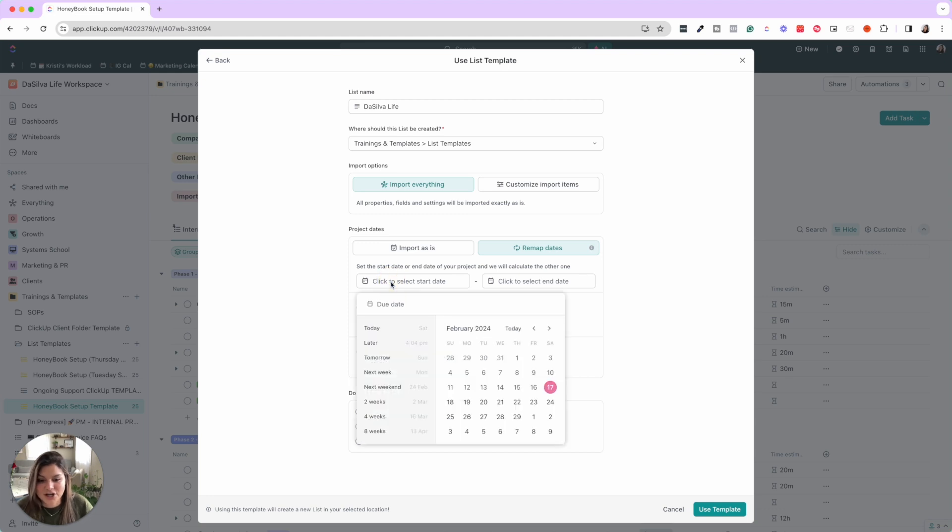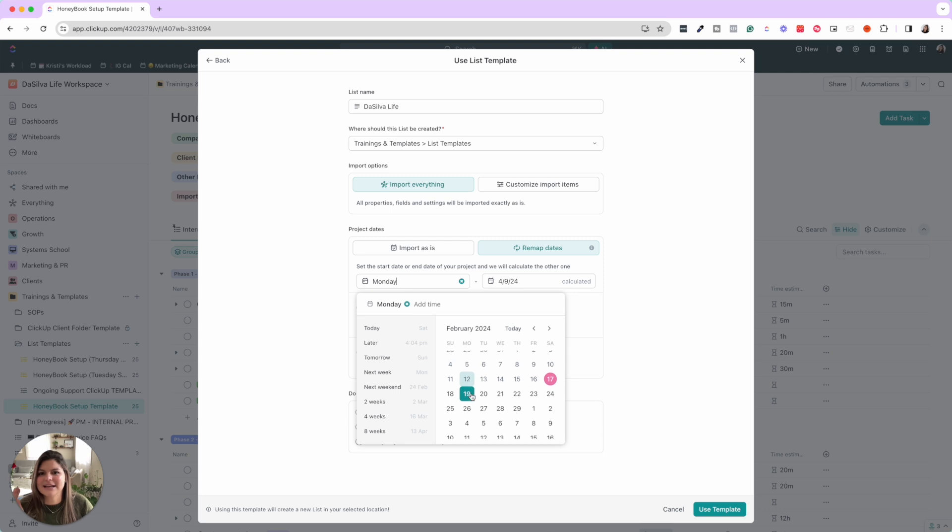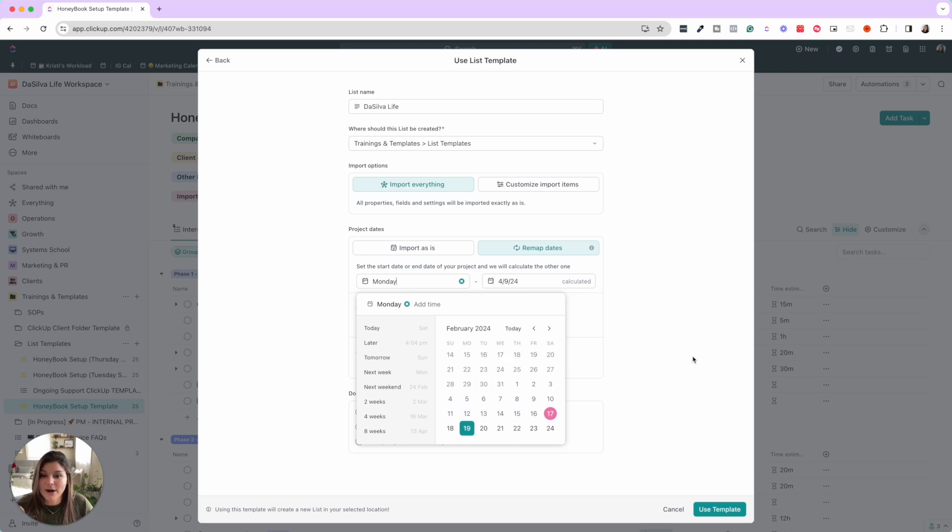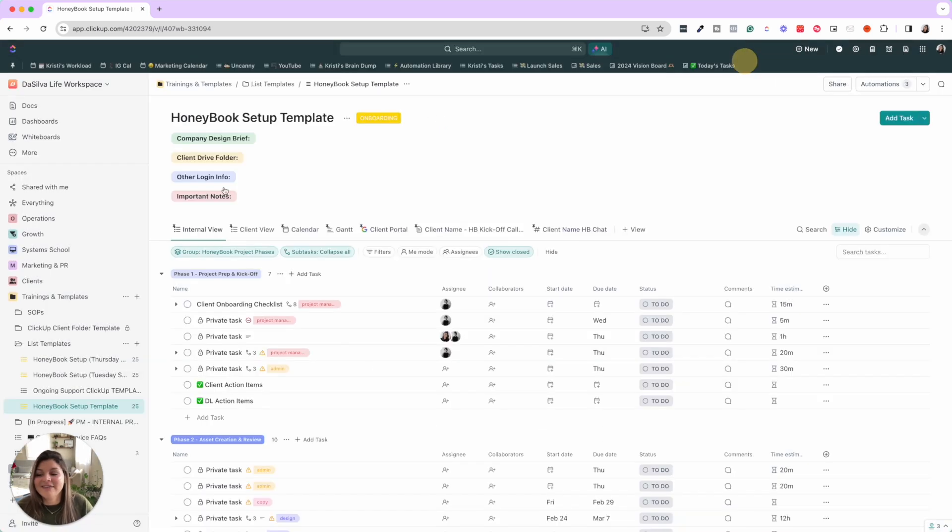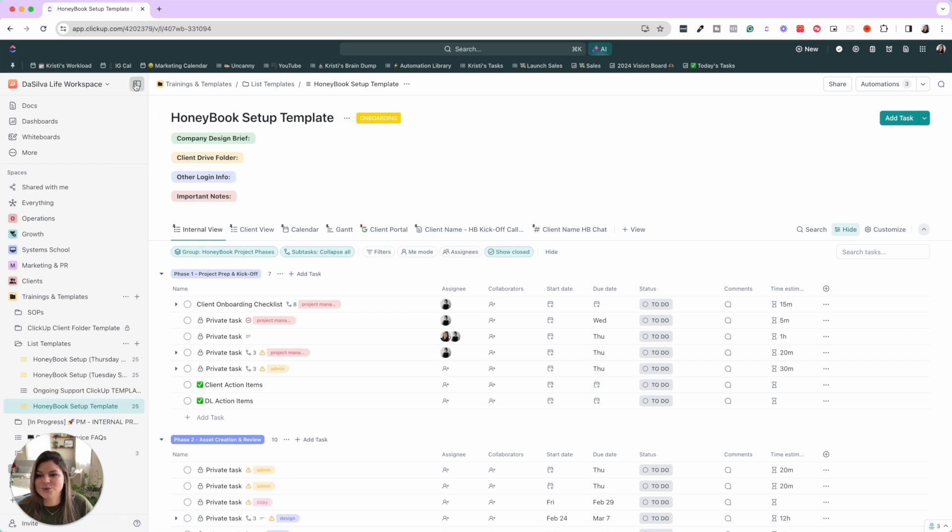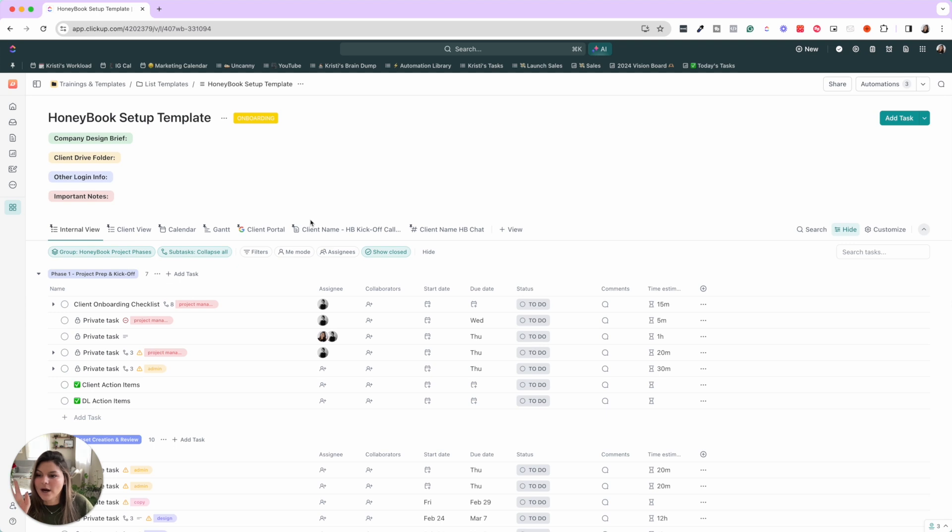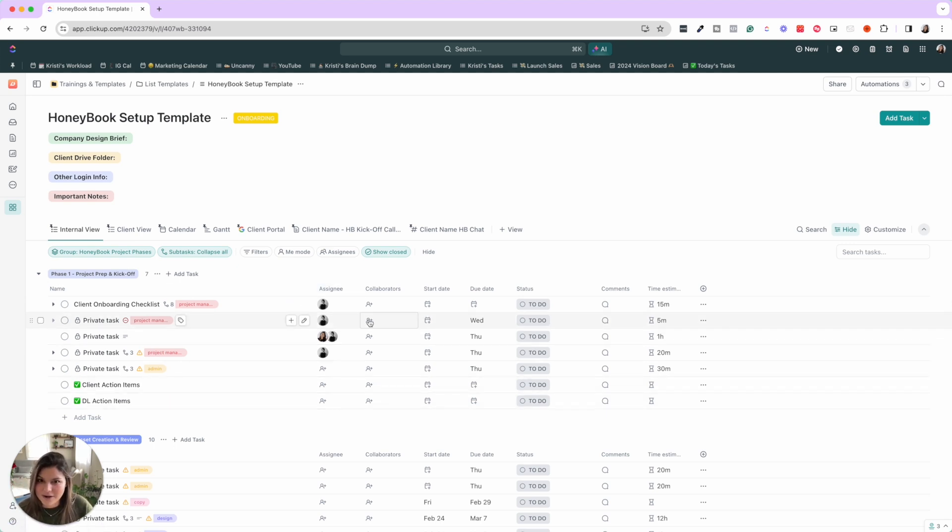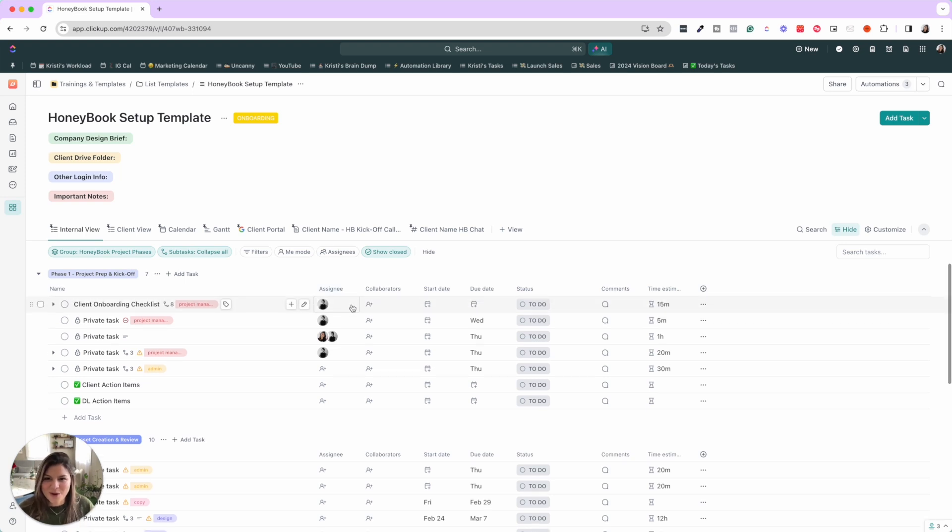So then the start date would be the day before the kickoff. So say we were onboarding on the 20th, we would do it as the 19th because then that first task is the kickoff prep for kickoff call. That's the first task in the list with a due date. So we would click that, click use template. And then what this is going to do is it's going to upload the template for the entire project. It's going to have who's assigned to what automatically, map those due dates automatically, and have everything that we need here. So let's walk through this actual template together.